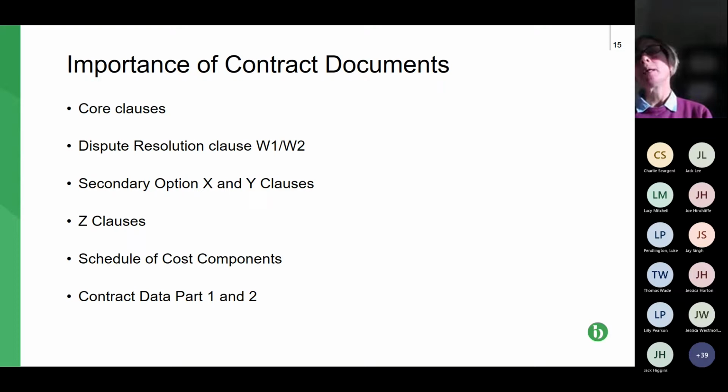But that, in my experience, then tends to make the negotiation of the main contract, the contract that is going to be signed once it's all been agreed, more difficult, because when starting the work under the letter of intent, expectations are set, and the paying party, the employer, the client, whoever's paying, then has an expectation that there are no exclusions of liability from the contractor's perspective, and ditto with subcontractors when negotiating contracts and letters of intent with contractors.